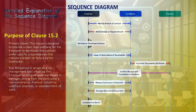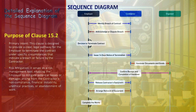Following notification of the breach, the contractor has the opportunity to either acknowledge or dispute it. This response is pivotal as it influences the employer's subsequent actions, potentially leading to either resolution of the issue or further escalation. The employer, after considering the breach and the contractor's response, internally deliberates on whether to proceed with contract termination — a decision that determines the fate of the contract and the project. If the employer decides to terminate, a 14-day notice (unless the situation warrants immediate termination) is issued to the contractor, marking the beginning of the termination process.